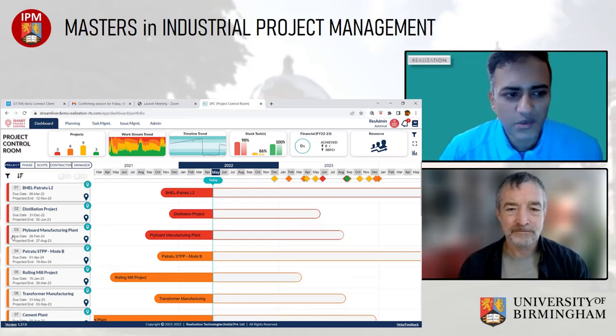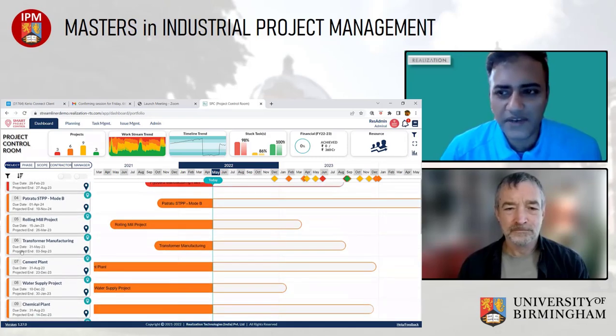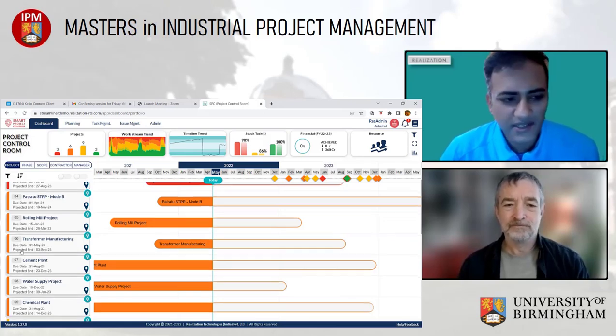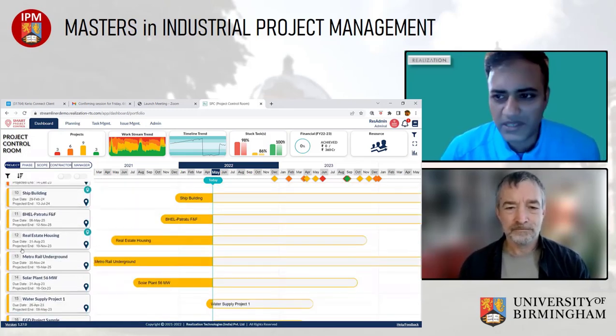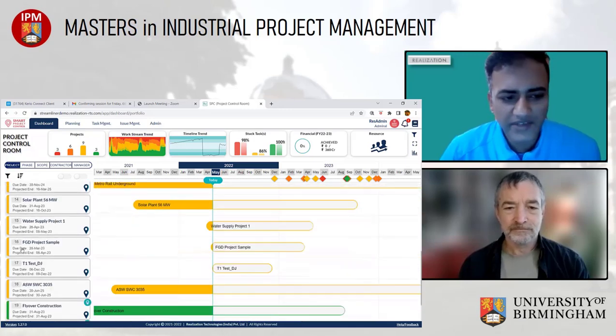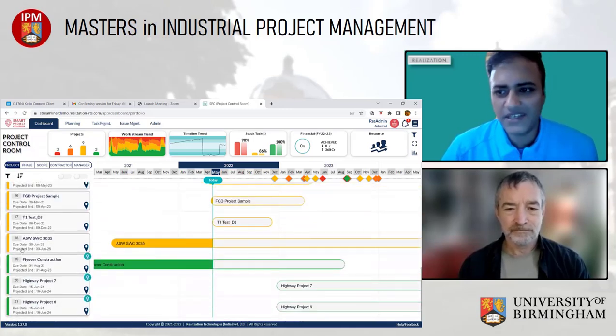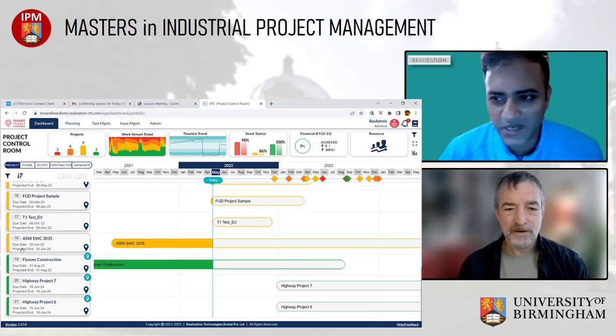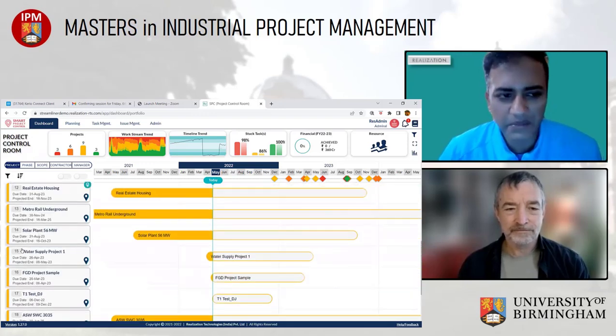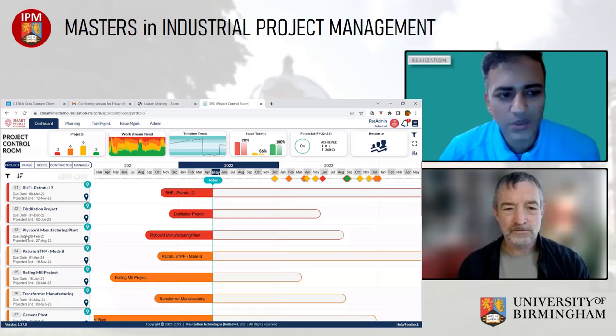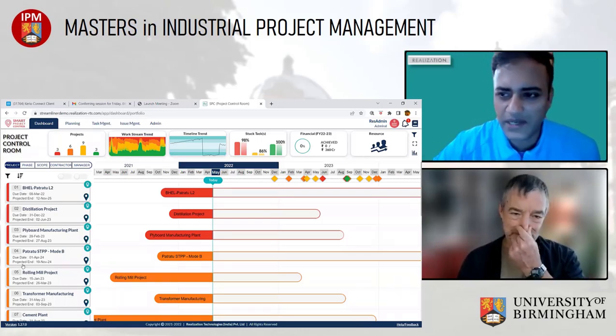What the color coding basically tells us is, if it's red, you probably can't get it back anymore. This project has gone too far out. If it's orange, yes, it's gone far out, but probably you can take a few key decisions and get it back. If it's yellow, don't worry about them. Site is managing it okay. If it's green, you're going ahead of time. Don't even think of them. They're going fine. This is the primary differentiation. Then the 1, 2, 3, 4, 5 is the relative priorities.